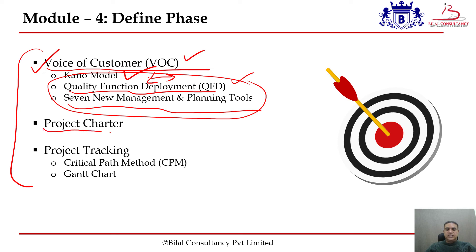Then, we will develop a project charter, which is basically a document in which we mention all the things: what are the benefits of doing this particular project, how long it would take to complete it, what would be our Critical to Quality, or what would be our KPI, and so on. All these things are mentioned in the project charter, which is a document indicating the starting and the improvement perspective.